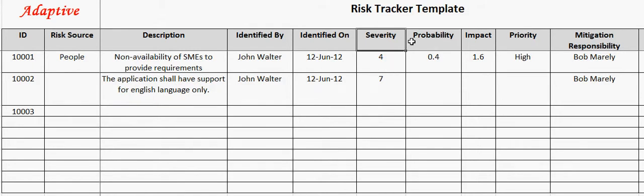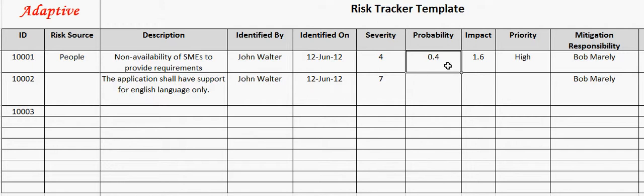Severity field captures the value of the severity of the risk in numbers. It can be from 1 to 10. For example, here the severity of the risk is 4. Probability field captures the probability of occurrence of the risk. It can be a value from 0.1 to 0.9. For example, here the risk probability is 0.4. Please refer to the risk management guidelines for understanding the rating scales for severity and probability.